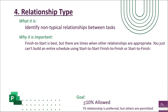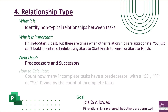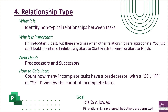To calculate this metric, you look at the predecessor and successor fields. Count how many incomplete tasks have a predecessor containing SS, FF, or SF next to the task ID number. Take that count and divide it by the total count of incomplete tasks. The goal is to get below 10% of tasks having a non-typical relationship — finish-to-start is preferred but others are permitted within that margin.